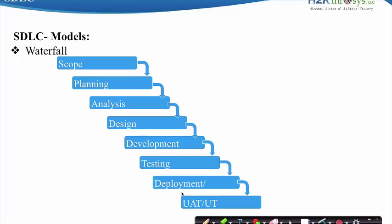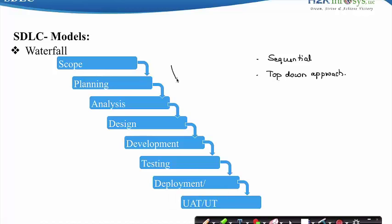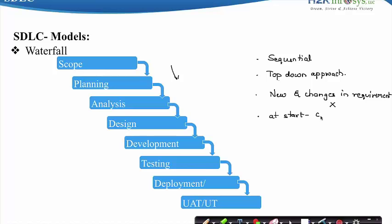The Waterfall Model is a sequential design process wherein all the steps have to be followed in the sequence as mentioned in the SDLC. It is a top-down approach — we start with the scope identification and move towards the user acceptance testing. We cannot go back to previous steps of the software development, and that is why new requirements and changes cannot be accepted mid-project. Clear and complete requirements must be gathered from the client right at the start. This model is applicable for simple and low budget projects.